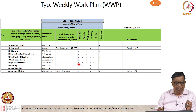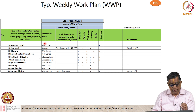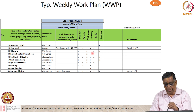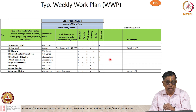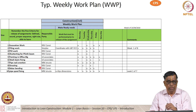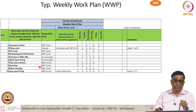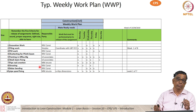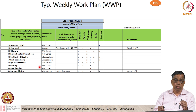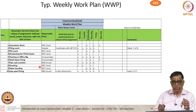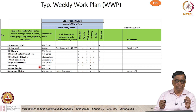The weekly planning is a very simple chart — you have the various activities, who is the responsible party, and from Monday to Saturday the various quantities written there, plus any remarks on resources required or problems to be solved. That is the plan for the coming week. With that, you go with great confidence because you know all the constraints have been removed, you have promises from all concerned people for all resources, and the method, size, and batch size are properly done. That is the advantage of coming up to the weekly plan.